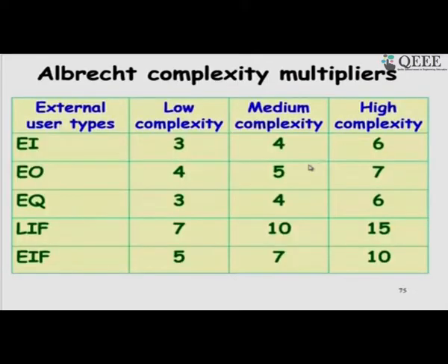And then the weights: we classify each external input, external output, inquiry, etc., by complexity, and based on the complexity, weights are assigned.